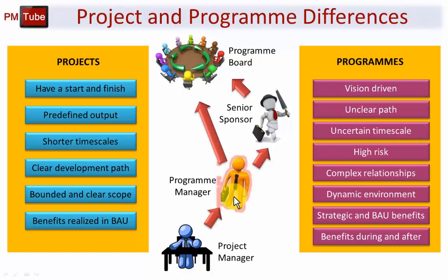This has some benefits for the project manager, because if the project forms part of a program, it's highly likely the program manager will already know certain aspects of the project. Early on, when we're looking at the concept and definition, the program manager may be able to give the project manager a full definition, description, either in the form of a project brief or requirements, because the program manager will know the part that project plays within the program.